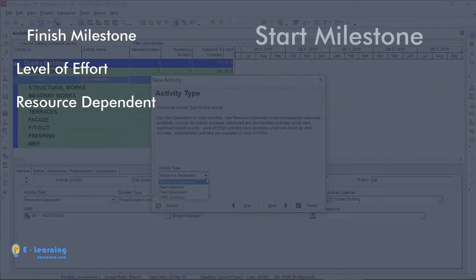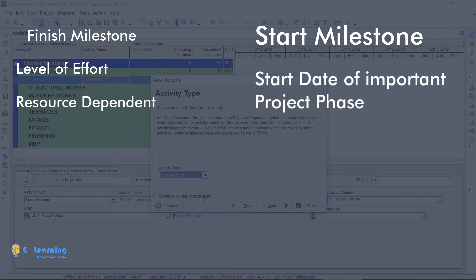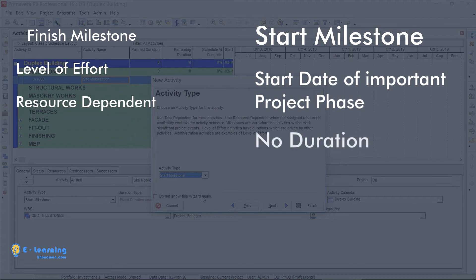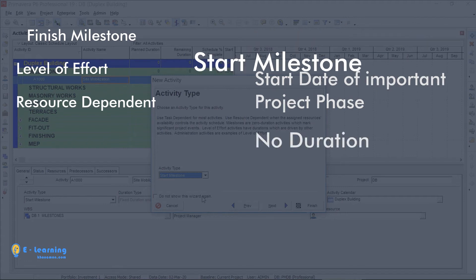Start Milestone shows an important project phase with its start date. In other words, it shows the beginning of a phase and it lacks duration.